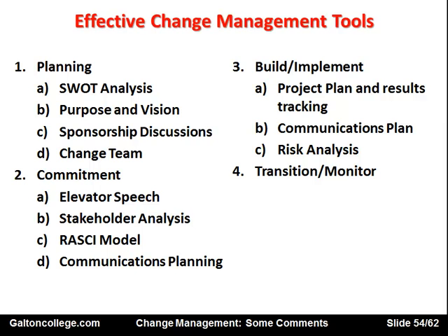And there's the transition period, when the company is almost running two systems. It needs to keep the business running, so it'll have the old system continuing, and the new system will be phased in. It might be phased in a bit at a time, section by section, or it might be a complete switchover. On Monday morning, the new system starts.